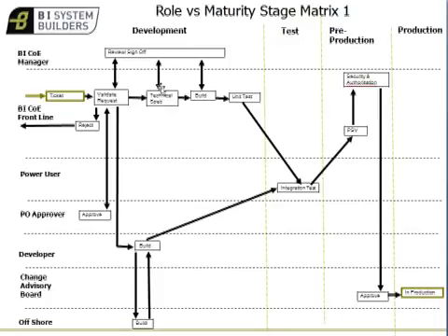Or he may just say go to, or she may say go to build and then to unit test. In this scenario, the build goes into integration testing, and the power user is doing the integration testing. And the reason that there's a suggestion of a power user to do the integration testing here is simply because the power user should have a good understanding of existing solutions and work closely with them.